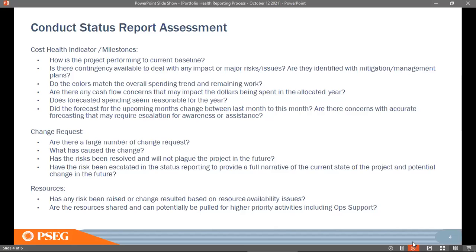Is your forecasted dollar more? Sometimes the overall estimate at completion even comes very well below the total approved budget. So that is also an issue, why we are leaving so much money on the table, right? Those kind of questions you should ask when you are entering the information, because these are some questions we ask when we are in the prep meetings and the main meetings.